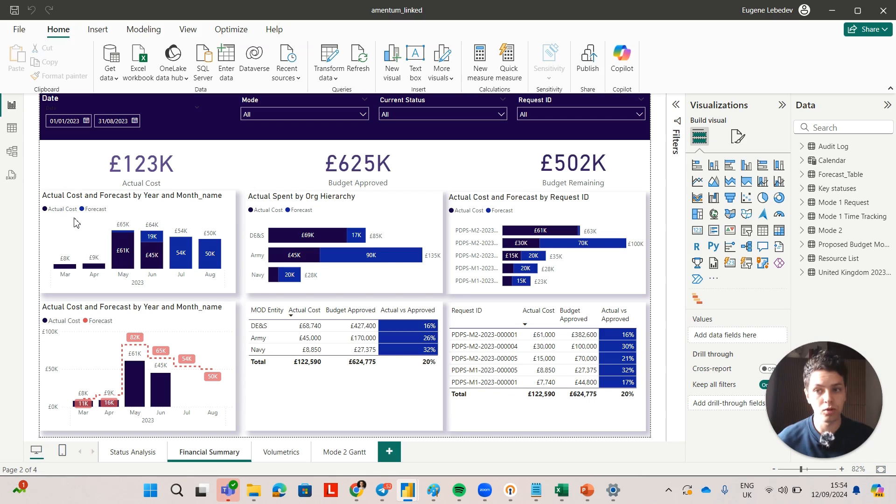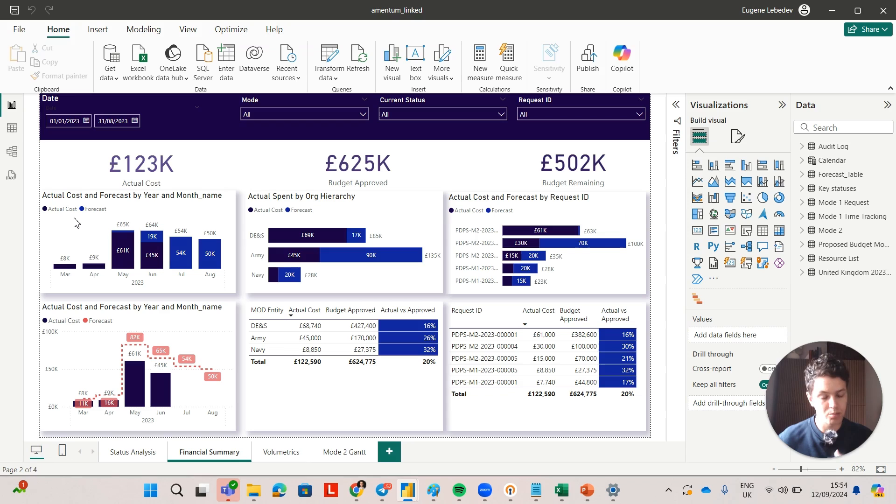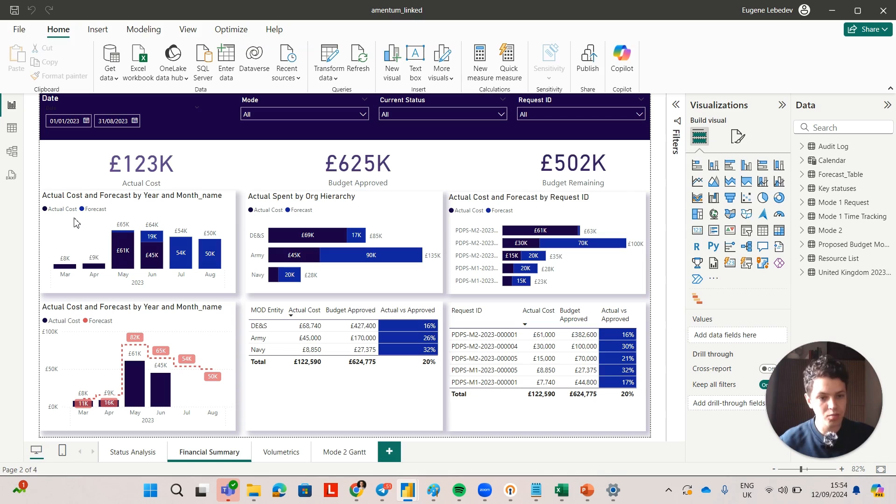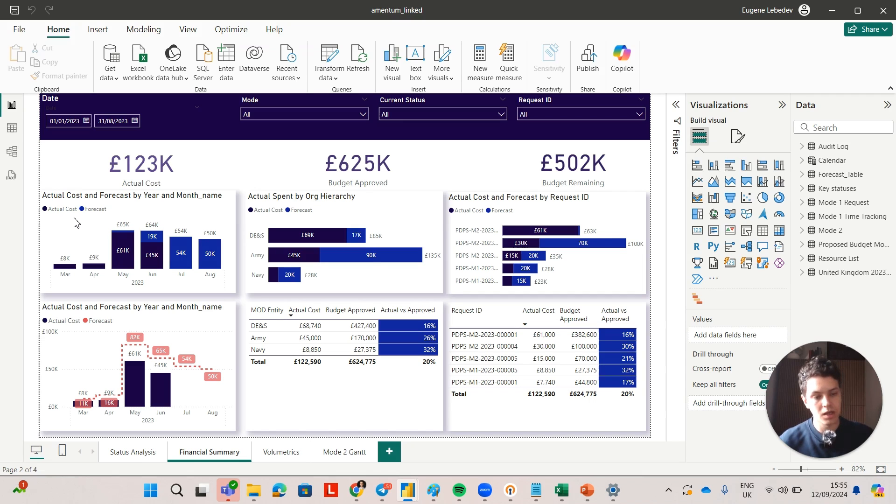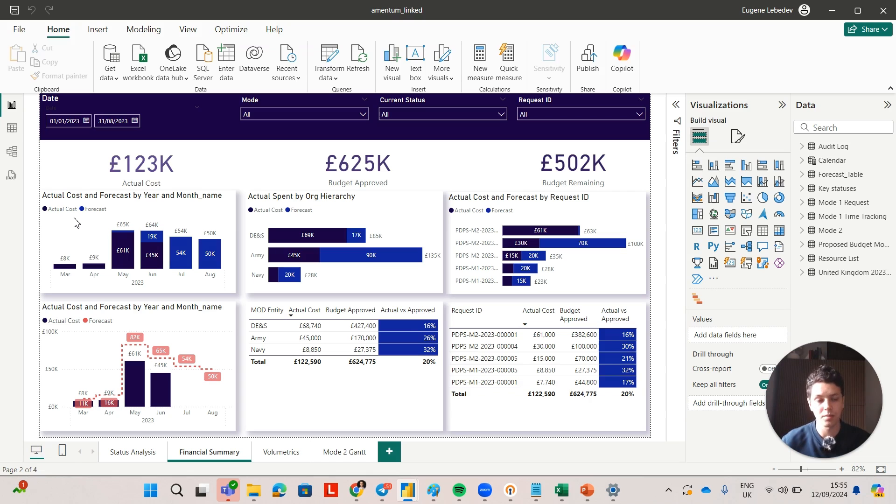In terms of the forecast, you can calculate that if you know the number of days that a contractor is approved to work, their daily rate, and also the working hours in the next year or however long your projects are. You basically need to create a calendar table which takes away the weekends, the bank holidays, times that people are off, and once you have that you can extrapolate the daily rates of your consultants over time. This is basically how you show forecast, and if you show the actual costs compared to it then you get the charts that we are looking at on the screen right now.